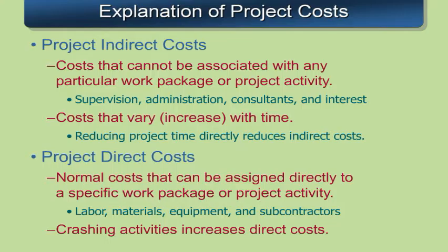As it turns out, over the course of time, those costs vary or increase with time. These indirect costs are less if we have less time in the project, since they tend to be incurred on a daily basis in a cost per day.